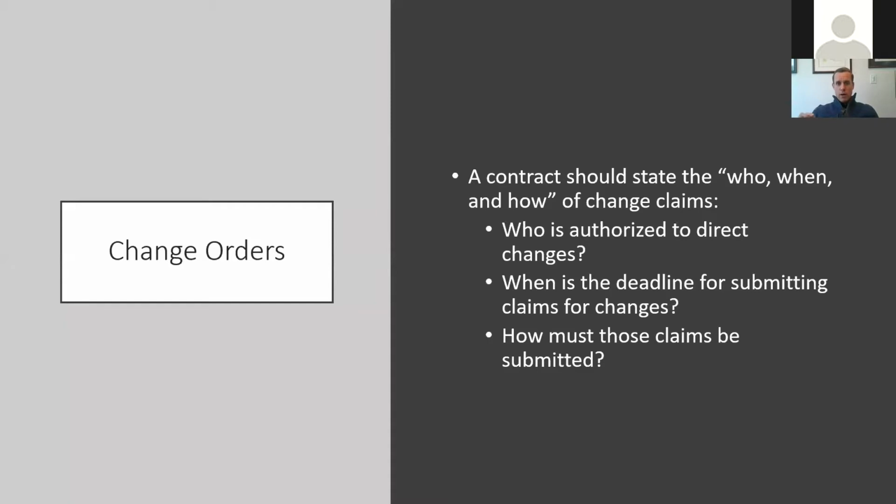So be aware. How long do you have to submit at least a notice that you intend to seek additional compensation? You may have additional time to actually submit your supporting documentation and how much it's going to cost. It's also important for your owner. Your owner may say, you know what, maybe we don't want to do it, or maybe we don't want to pay that cost. And in that case, it's important for you not to do any work or go out of pocket for any work until your client is aware of it and until your client agrees to pay for it. Again, it's as much a relationship tool as it is a sound business practice.